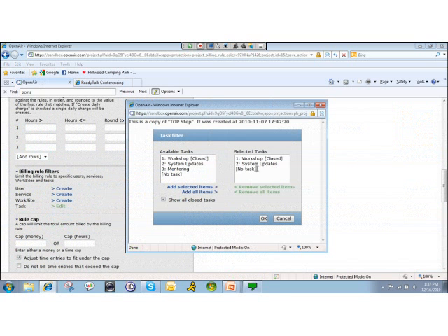If I add no task, then the method that I'm using are the bookings, for example, that say, Joe is going to be busy this month, okay? That booking, because it has no task on it, will get picked up in this rule as a forecast. So when time is put on the project, my timesheets require a task. So I'll always have a task, which means if any time is put on mentoring, it'll filter it out.